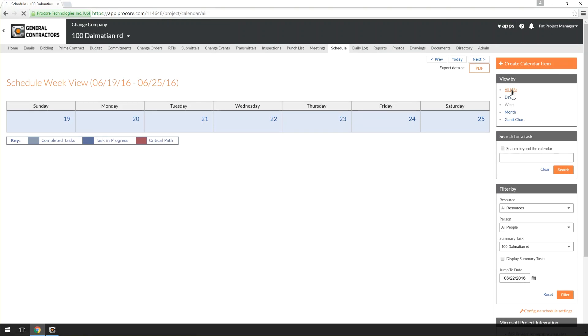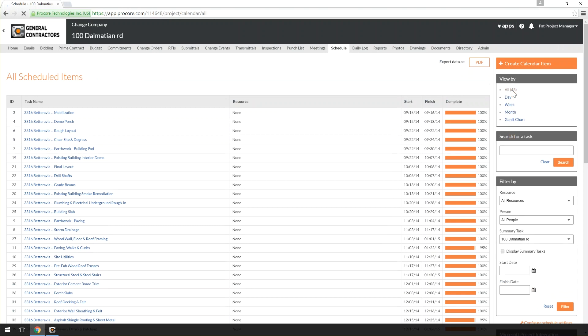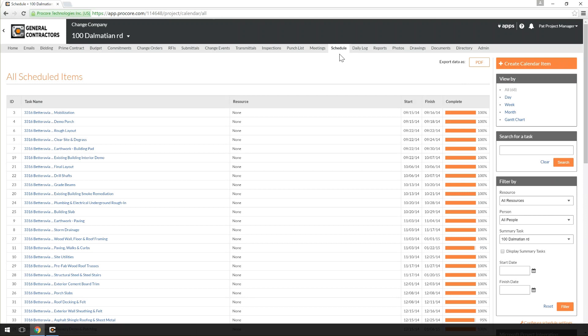The second way to upload the Project Schedule is to manually upload it directly to the Schedule tool in the web application. However, unless you're working on a Macintosh computer and cannot download Procore Drive, Procore recommends that you integrate your Microsoft Project Schedule with Procore Drive. Unlike integrating the Schedule file with Procore Drive, you will have to manually upload the Schedule in the web application each time there is a new revision. And doing this will reset all change history associated with the old Schedule, making it hard to report on and track changes to the Schedule throughout the Project.